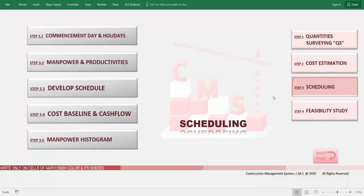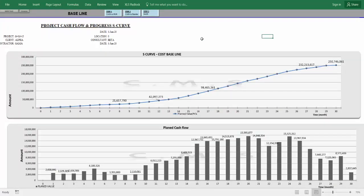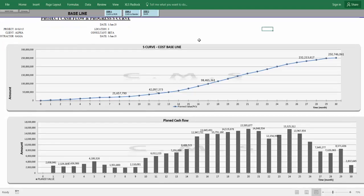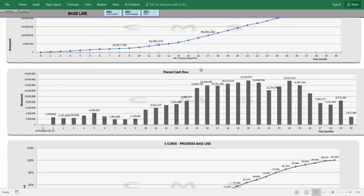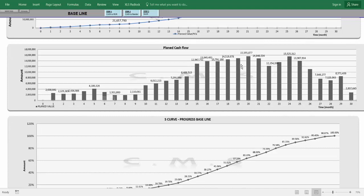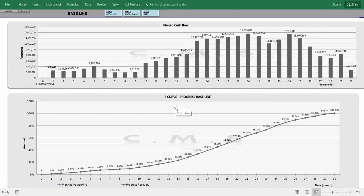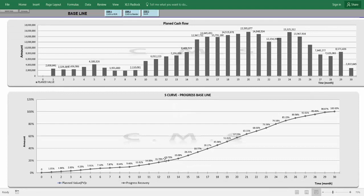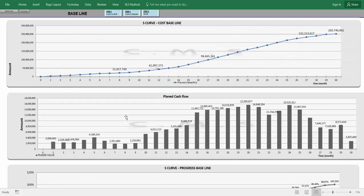After developing the schedule, CMS automatically produces a cost baseline and monthly cash flow, indicating the required cash flow at peak and for every month, and the percentage of progress required each month — all coming automatically.